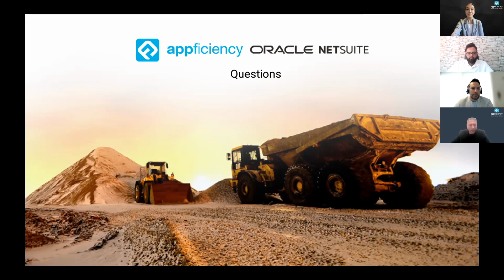Amazing. One more thing that I would like to add to what Hamid mentioned. If you think about the construction industry, there are three specific ways that we usually calculate the percent completion. One, you calculate the percent completion according to the cost. Two, you calculate the percent completion according to the actual progress that you made. Let's say I'm supposed to install 1,000 blocks on a wall, and I install 500 of them. So I can simply say, okay, my physical progress is 50%.